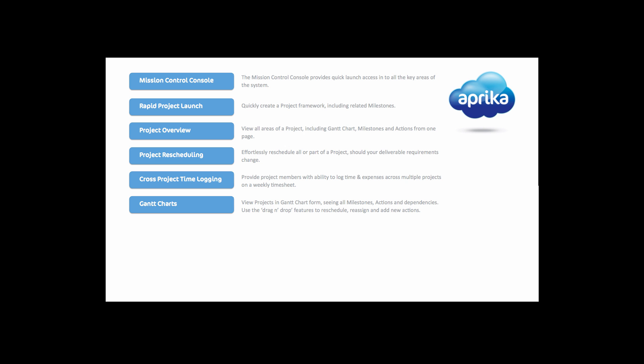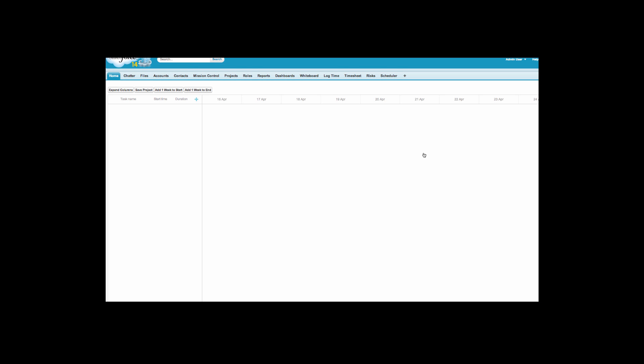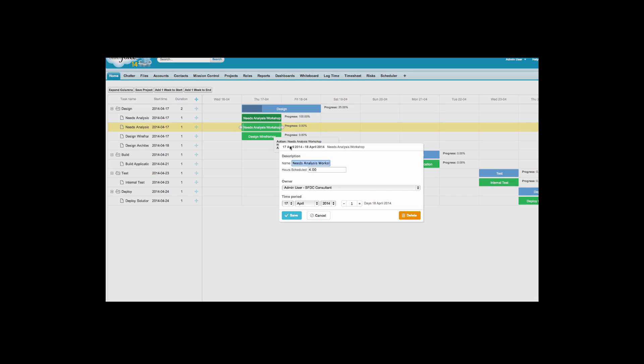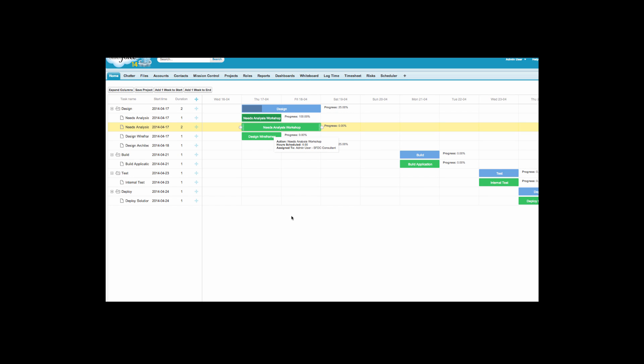Mission control includes a Gantt chart feature allowing you to view and edit any of your projects in a visual manner. You can make changes to an action simply by clicking on the action. As you can see, the Gantt chart has a very user friendly interface, with drag and drop action rescheduling capabilities.